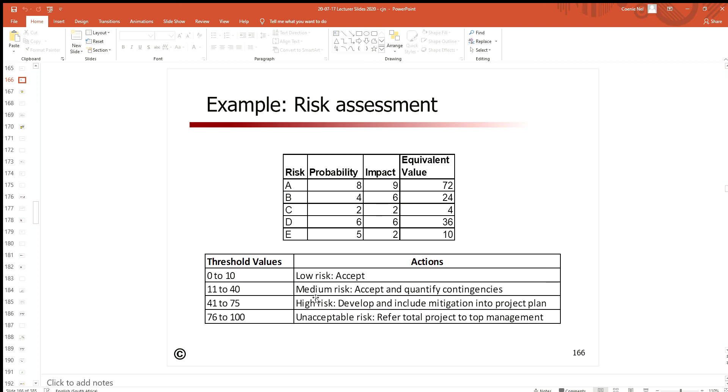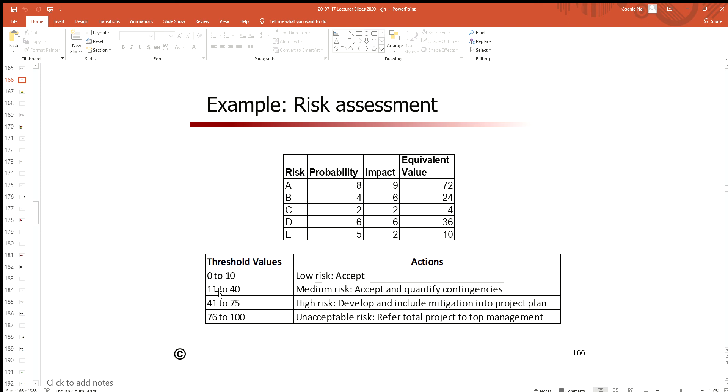The reason why I'm not dealing with hard values over here, why I didn't tell you 10, 40, 75 and so forth, is because this is specific to the project that you are in. Maybe if you are a company or a project that deals with very high risk appetite, it means these values are going to be lower. It might be between zero and five will be a low risk.